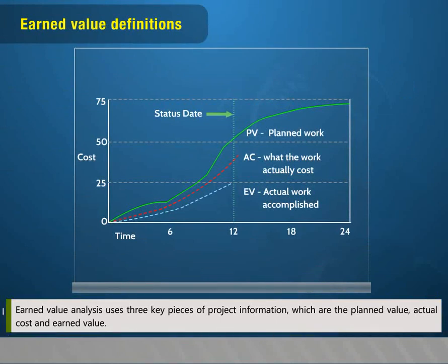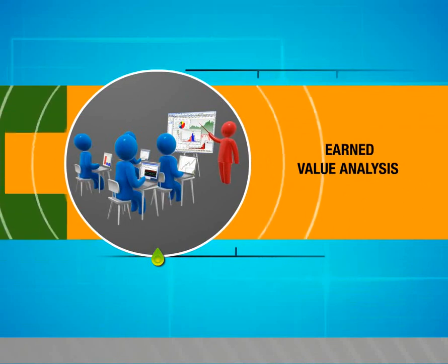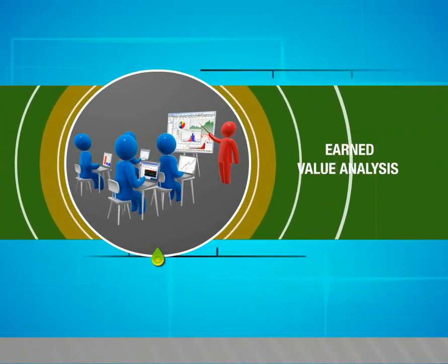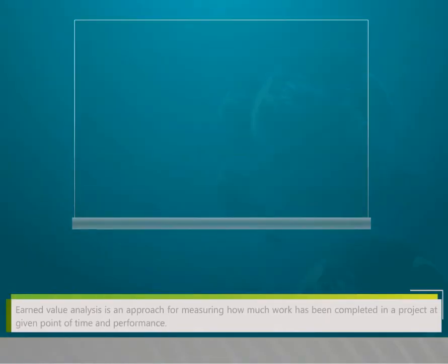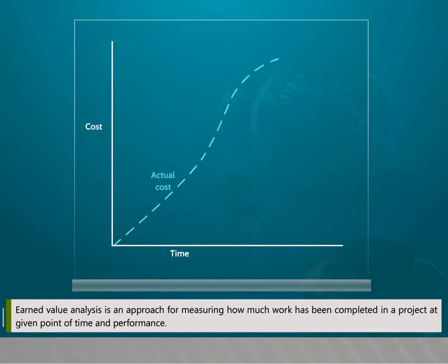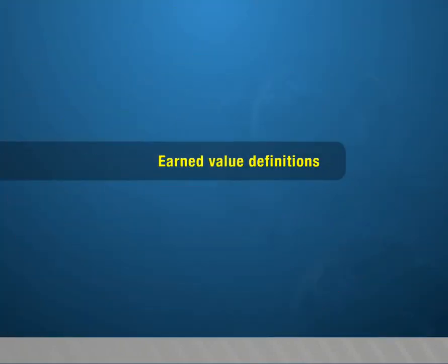Two other progressing techniques commonly used are listed below. They can be either quantitative and/or qualitative depending on how they are used. The techniques are combination techniques, good for complex work occurring over a long time period and using two or more of the other progressing techniques. Apportioned relationship. It has a direct intrinsic performance relationship to another discrete work package, which is called the measurement base.